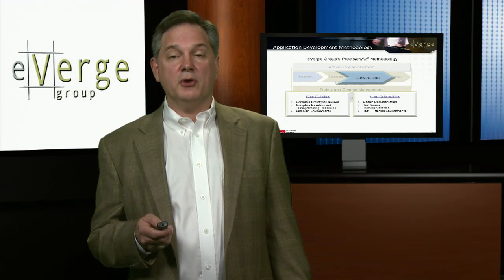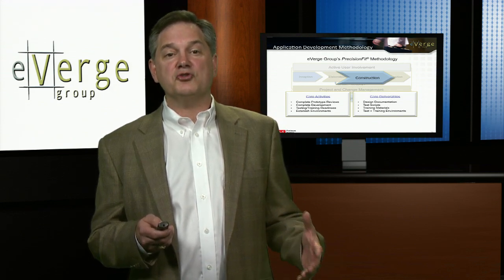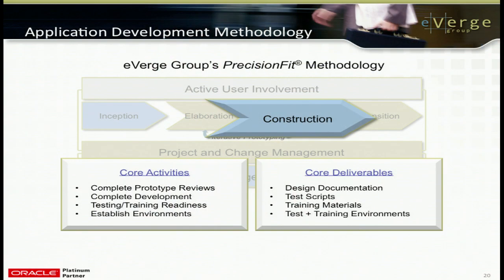Finally, as requirements are frozen and we continue prototypes, we continue development in the construction phase, and here we actually complete the development cycle. We're doing most of the prototypes. As I mentioned, in elaboration those prototypes are meant not only to start getting the solution design right, but really to finalize requirements. The prototypes in the construction phase are specifically to not just freeze requirements, but to freeze the solution design, to give them an enduring solution design that will last ad infinitum and help achieve the business objectives and business aspirations of our clients.